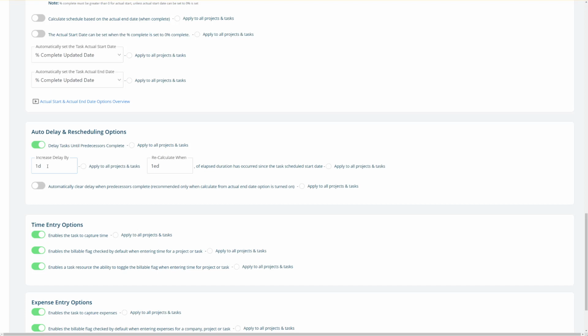That way a task will never become overdue if it's the successor. It's like if you're waiting on something to be done, it'll keep rescheduling it. And then of course, any other successor tasks after the rescheduled one will also be rescheduled automatically.